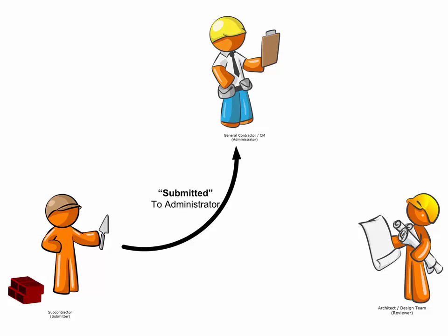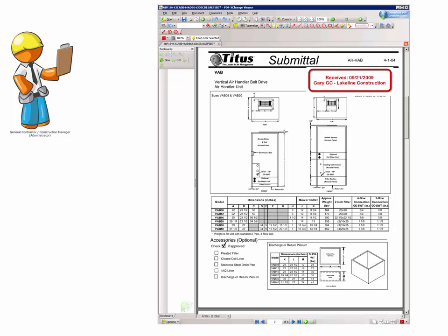The construction manager is simply looking to make sure that the documents that have been received match what they requested. They do not look at the actual content of the submitter and try to compare it to the specifications of the project. That, in fact, is the job of the architect. However, frequently, the construction manager, if the information is correct, will actually stamp in the document, as they call it. And stamping in usually means putting a cover page or stamp directly on the documents that have been submitted to indicate the date it was received and that they believe that it has been reviewed and is ready for the acceptance or the approval by the architect or the consultant and engineers.